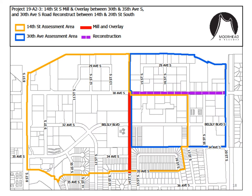This map shows the assessment districts for this project. The dashed purple line shows the limits of the work on 30th Avenue South, and the red line shows the limits of the mill and overlay on 14th Street South. Properties immediately adjacent to either of those projects will receive a front footage assessment based on the rate for the type of work being done there. The yellow line is the boundary for the 14th Street area-wide assessment, and the blue line is the boundary for the area-wide assessment for 30th Avenue South.